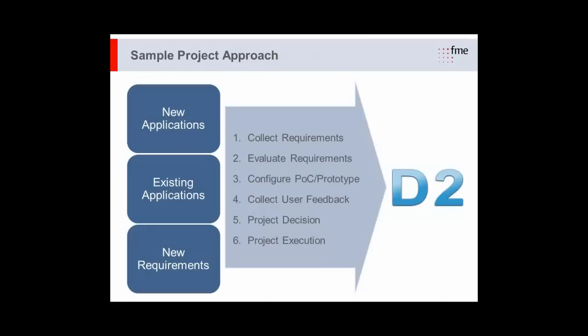And then during the project execution, you have the advantage that the existing prototype can be used as a basis for the implementation, and the custom application can be built on top of it, and then it can be developed in multiple iterations by gathering feedback and then enhancing the client step by step with additional configurations.